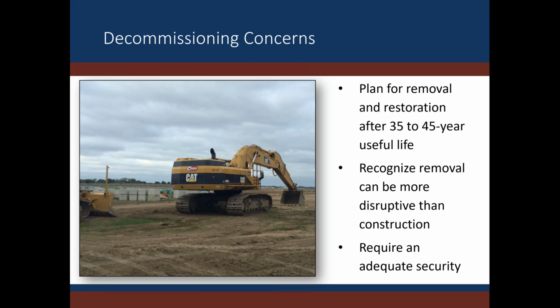We recommend requiring applicants to submit a decommissioning plan, cost estimate, and security. In the plan, we recommend requiring complete removal of all equipment. However, we've always had a discussion with applicants and landowners about things that the landowner might want to retain, such as fences and roads, and things that are more disruptive to remove than they were to install, such as the driven piles or any conduit that was bored in. We recommend a cost estimate that does not account for the eventual salvage value of the removed materials, just because we have no idea what that market will look like that far out.